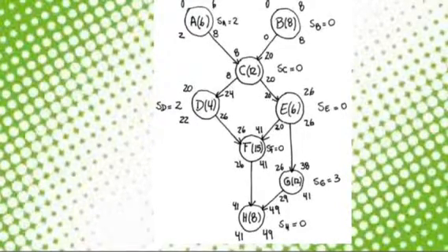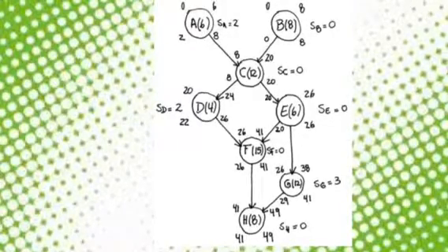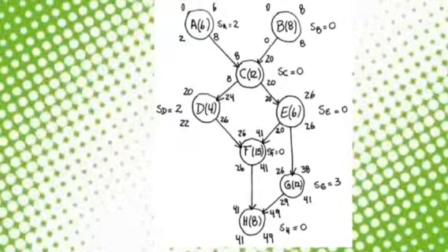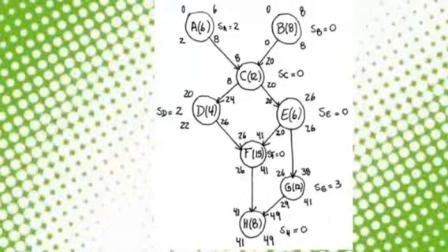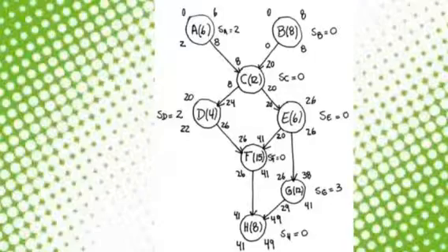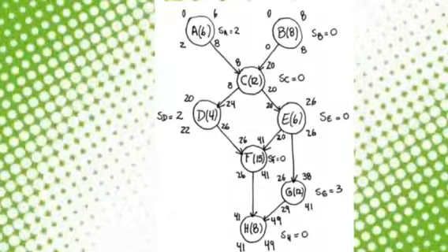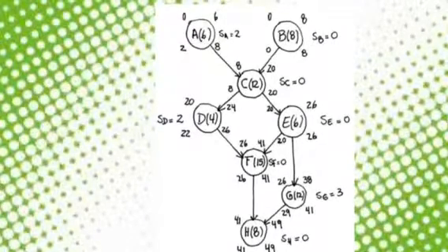Then we identify the indicators IC and TC for each activity. For example, the nearest beginning for activity C is 8. This is because C can only begin once A and B are finished, being B the most delayed, and finishes in 8, and the nearest end is 20 provided that the activity C lasts 12 weeks. Later IL and TL are obtained for every activity. With this information, the calculation of the clearance of every activity is simple.